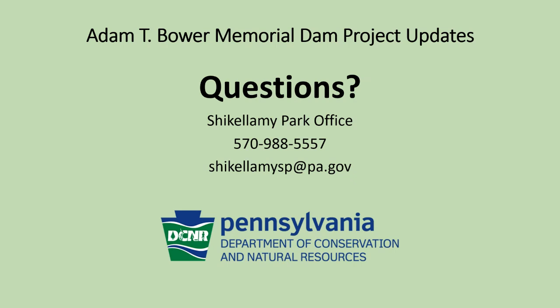So currently, this project traditionally does take a few weeks to complete. And while we will get into the river and begin work as soon as we can, that date is currently unknown. We are at the whim of Mother Nature. But if you look at the data, it is traditionally that midsummer time is when the work could begin. So, as shown earlier in the presentation, a later in summer date is realistic for when the dam could be operational for the lake. So plan on that as you will. Definitely is going to be a later start date.